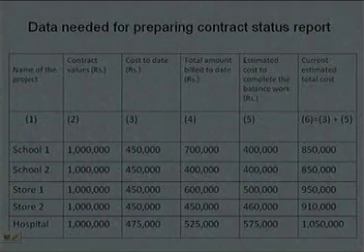So, this is as far as the first topic of today's lecture was concerned, that was how to prepare the contract status report. So, I will just summarize how actually we go about it. For this, a number of persons are responsible: your accountants, your planning engineer, your top management of the construction company. All these people try to generate such a report, which is essentially the estimate of the likely cost at completion, and from the physical records you know how much cost you have incurred.